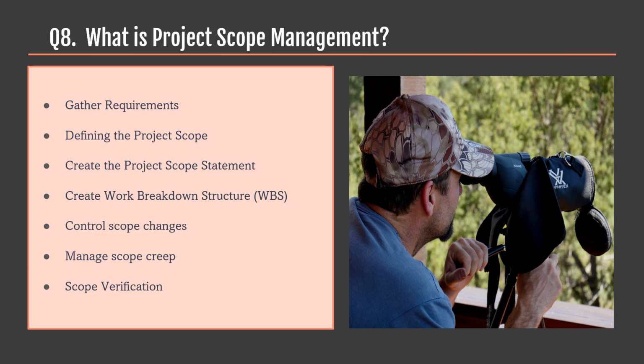She created a work breakdown structure (WBS) to break down the project scope into manageable components. For instance, WBS Level 1: Mobile App Development Project. WBS Level 2: Planning, Design, Development, Testing and Deployment. WBS Level 3: Design UI, Develop Database, Implementation and so on.